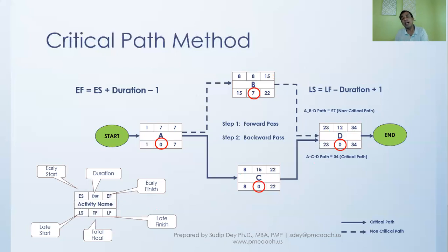But anyway, activity D is not going to start before 23rd, so there is no impact. So if you get delayed in the activity B, let's say by 6 days, instead of finishing on 15, it finishes on 21, still there is no issue. I mean, there's no problem. So essentially, till 7 days, so 7 days the float. There is a flexibility in activity B for 7 days. If it gets delayed up to 7 days, then there is no impact in the final date of the project.